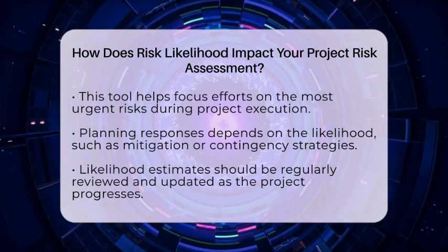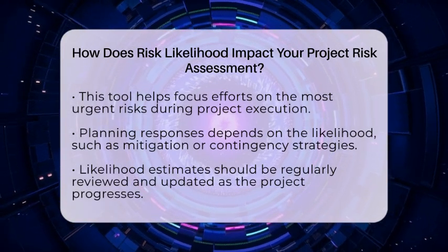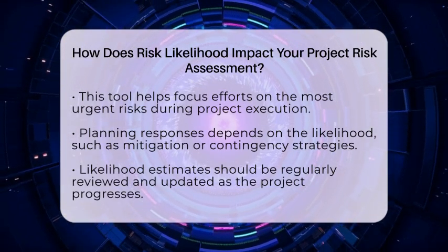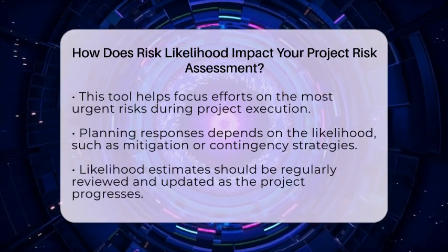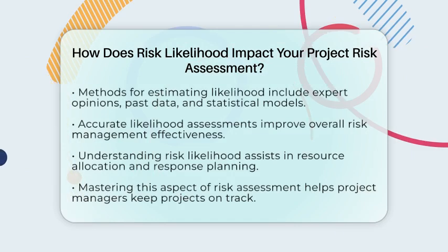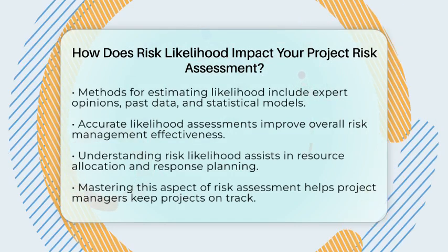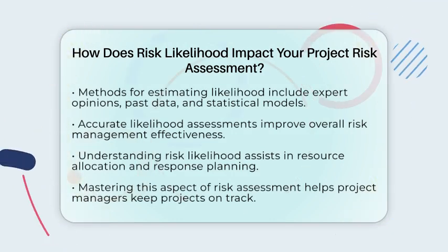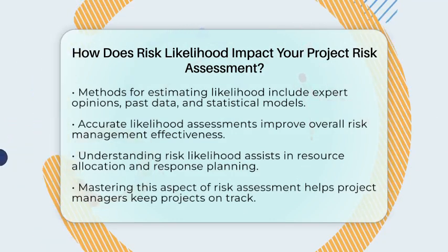As your project moves forward, new information might change how probable a risk is. Regularly reviewing and updating your likelihood estimates keeps your risk management sharp. To estimate likelihood, project managers often use expert opinions, past project data, or statistical models. The more accurate your likelihood estimate, the better your overall risk assessment will be.